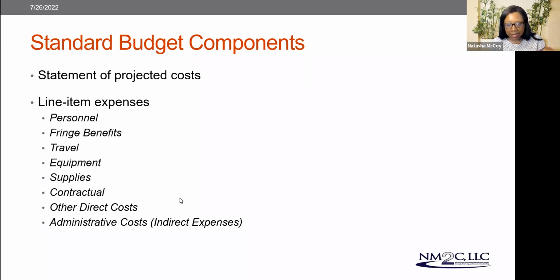10 to 15% is allowed for paying for your oversight expenses, because there are going to be some expenses that may not necessarily fall in line directly with your project or budget. Those are the expenses that go into rent, your building insurance, your electricity. Those are things that may not be directly related to the project, because we're talking about an outside playground here, but the staff need to work someplace that has lighting and electricity and air conditioning for them to work on building the project, building the playground. So know that it does relate to the project, and that's why it falls under indirect costs.